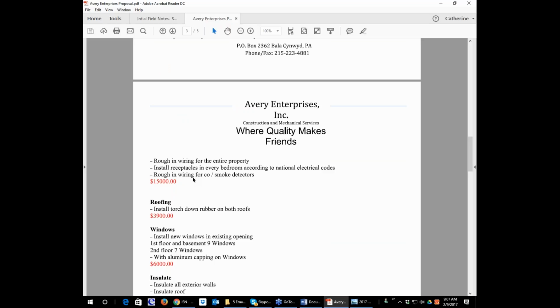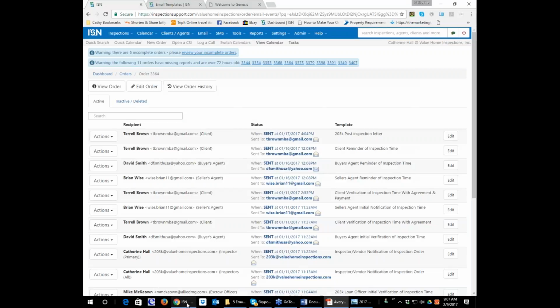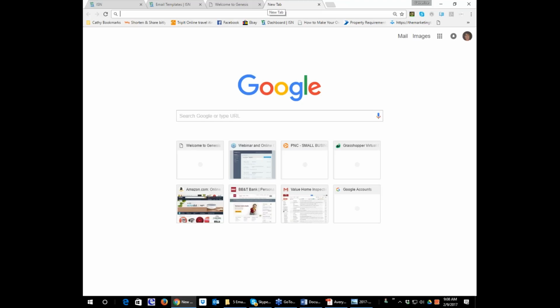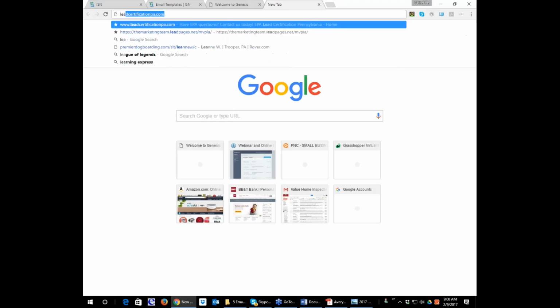What you're going to do when you get out to the property is ask the contractor to be present. If they already have a contractor, you're going to find out if he's validated. Before you meet him at the property, you get your back office to check: does he have all the proper credentials, particularly his EPA Lead Safe Practices certification? This contractor did not come up on the roster. And you can search for Lead Safe Remodeler.